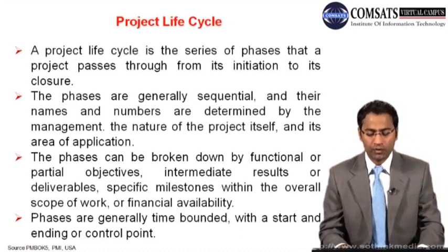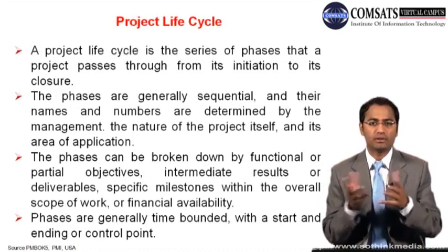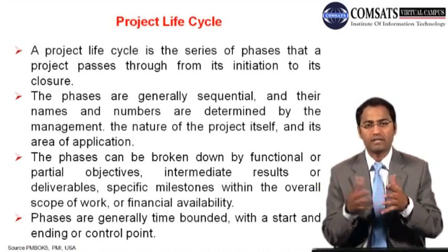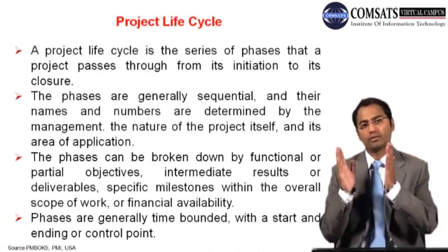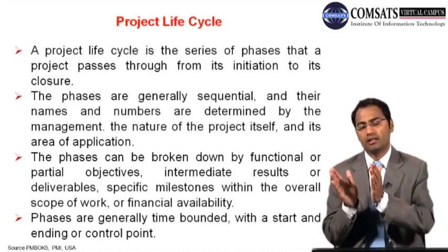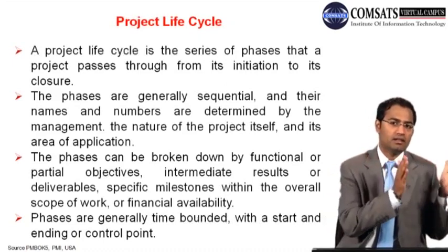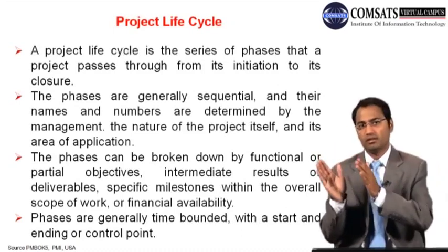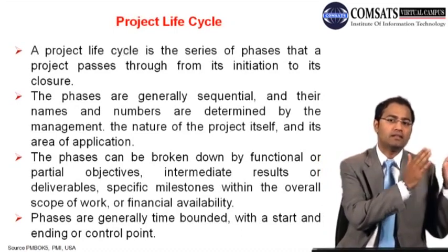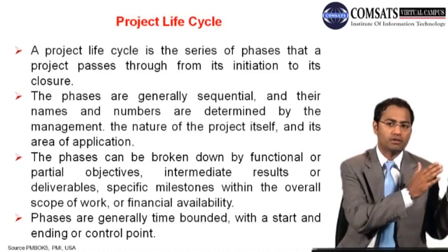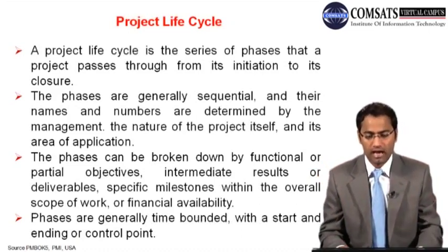So similarly, we may have a social sector project, and they have to actually impart some literacy, they have to actually increase the literacy rate. So what will be the probable phases? So first thing is they initiate and plan, then they go and carry out the surveys, and then they do analysis. So initiation, surveys, analysis, decision making or project appraisal, and then they implement the project, and then they wrap up. So there are four or five phases in that project as well.